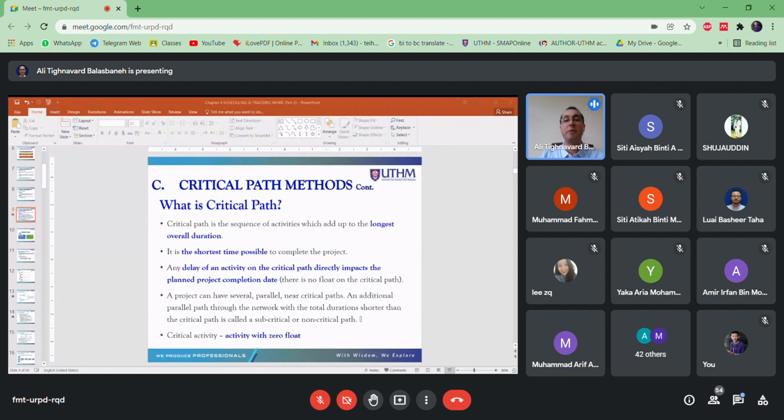It is the shortest time possible to complete the project. This is another definition. Any delay, I repeat again, listen, any delay that happens to the activities located on the critical path will mean that you cannot finish the project on time.